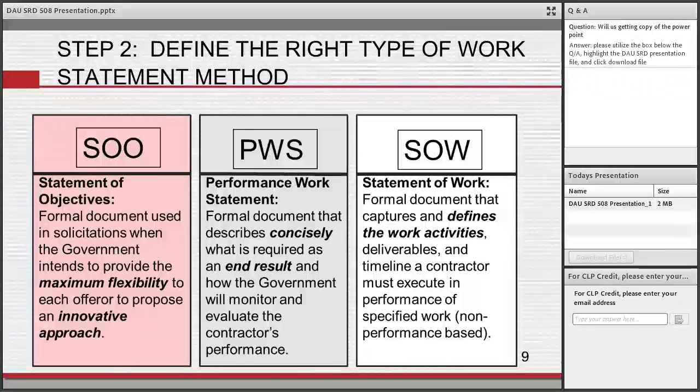The SOW would say, we are going to paint a 2,000 square foot room royal blue, ship number BL62. We are going to use a 1/4 nap roller. We are going to roll 2 coats vertically, one coat horizontally, and then another coat diagonally until we have covered all of the surface area.